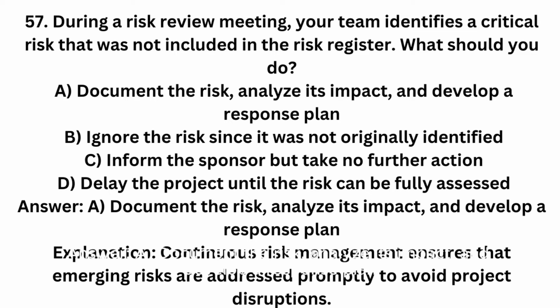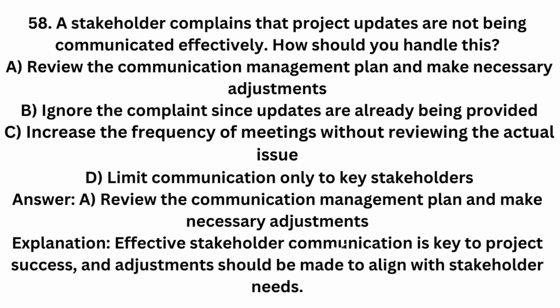Answer: document the risk, analyze its impact, and develop a response plan. Explanation: continuous risk management ensures that emerging risks are addressed promptly to avoid project disruptions. 58.